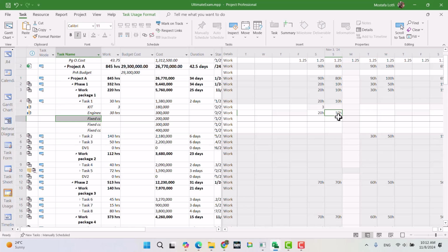For example, you need to know that the engineering team spent 20 hours on this day, because the plan was to spend 20 hours on this day. The information that you receive to update your project plan must be aligned with this level of planning. If you're planning at this level of detail, then when you want to update your project plan, you also need information at this level.